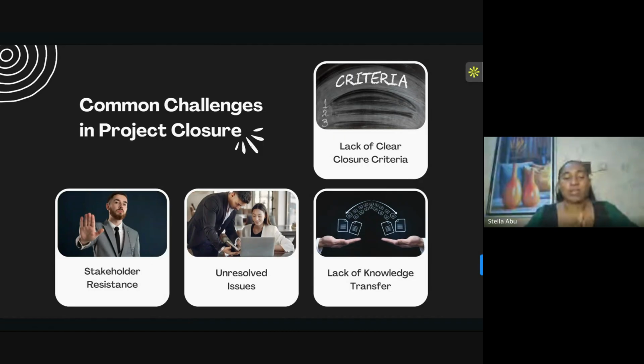Another thing is unresolved issues. Remember when we did issue management, when we said that an issue is not something that is going to happen, an issue means it has happened? How are you able to solve it? It means respond to it right now, find a solution. Sometimes when there are a lot of issues and you're not able to resolve them, it can delay project closure. You're not able to deliver that project to the owner, the users, whoever is supposed to benefit from this project, the stakeholders.